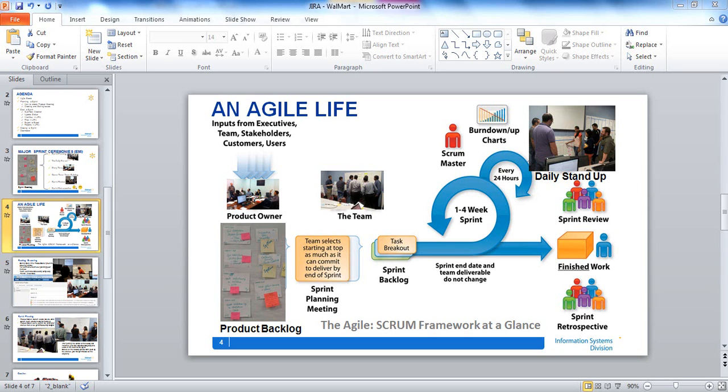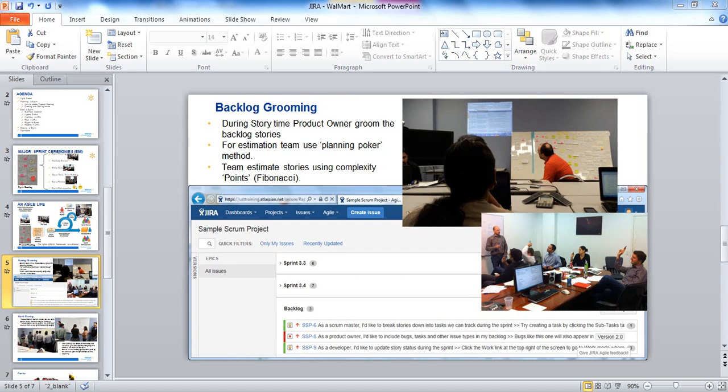This is an EMI Agile Scrum framework at a glance. In EMI Scrum projects, we follow a 2 weeks time box for each sprint. During the demo, I will explain the events and ceremonies we follow for each sprint and how we tie sprint and PSI activities to JIRA. Before the sprint, product owner and PS start working with the team to write stories and eventually generate the product backlog.